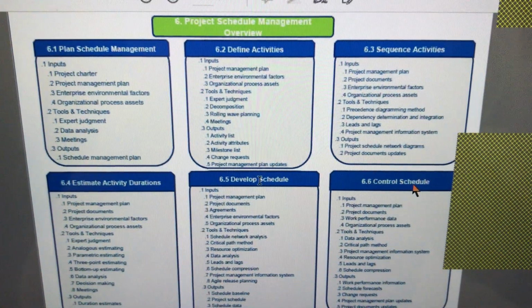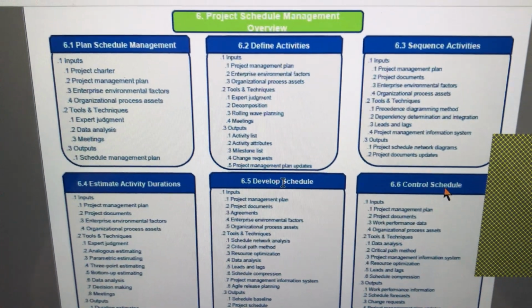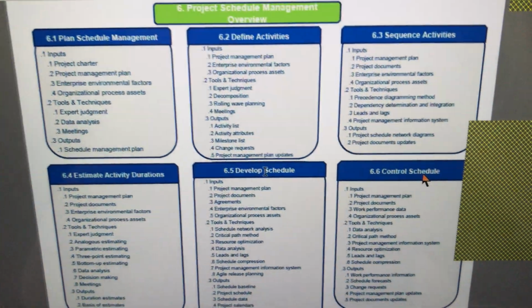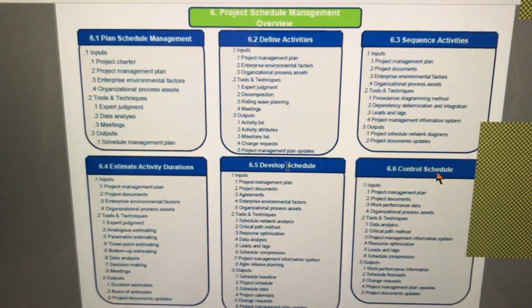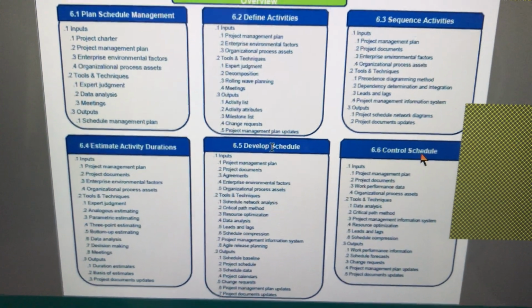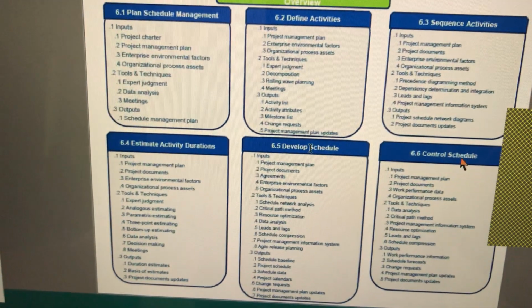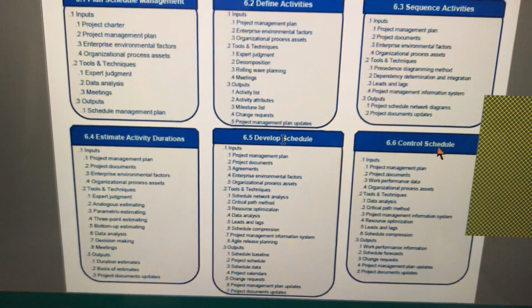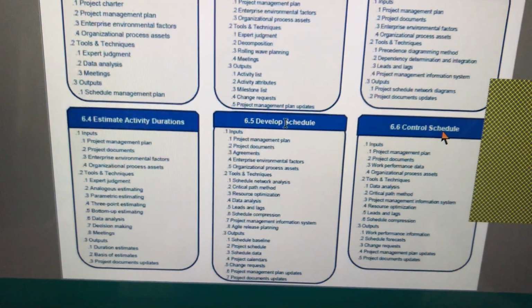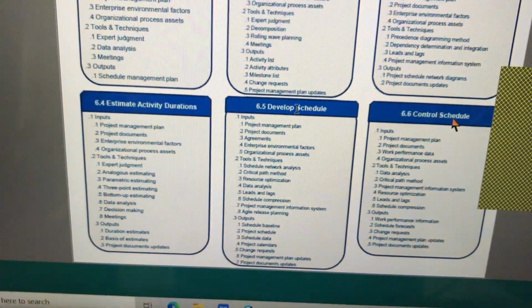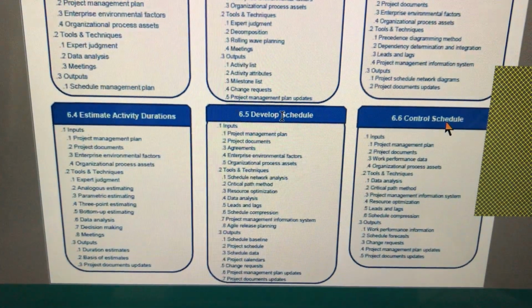Even if the project sponsor says, add more people. Adding more people sometimes may not speed up the work beyond a point. In some cases it could, in some cases if there is a mandatory dependency. For example, let's go back to the painting example, 4 activities I said. Buy paint, scrape wall, apply primer, apply final coat. Scraping the wall, if it takes 1 day, it takes 1 day. Putting 2 people on the job, will it speed up? The nature of the activity, does it allow? If it allows, then it can be speeded up.